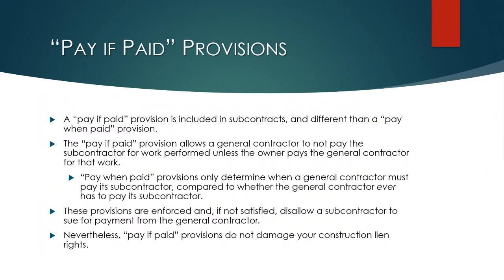So what does that mean for subcontractors and suppliers? Certainly the pay if paid provision, as long as it's got the right bells and whistles on it, is going to be enforceable under Florida law. There's nothing that prevents a general contractor from including those provisions, if properly worded, in their downstream contracts. Nevertheless, even if you have a pay if paid provision in your subcontract supplier agreement, that does not mean that you do not have lien rights. You have a right to be paid. Your recourse may not be against the general contractor if in fact the general contractor has not been paid for your work. If the general contractor has been paid, that's a different story.